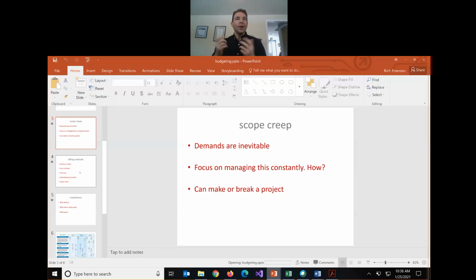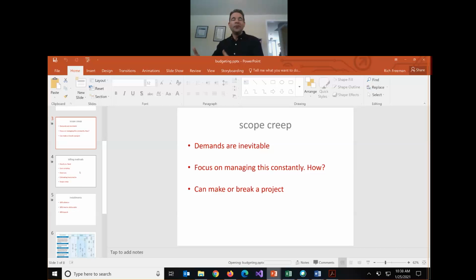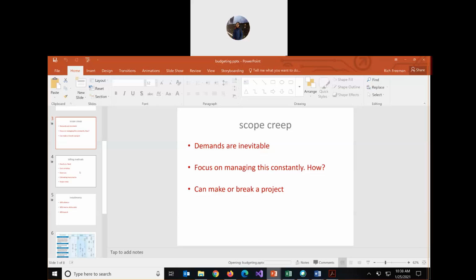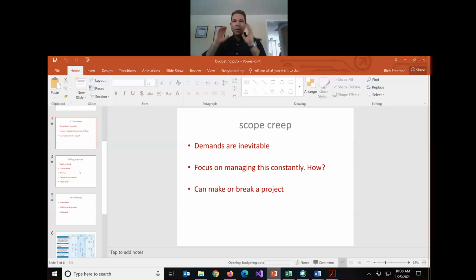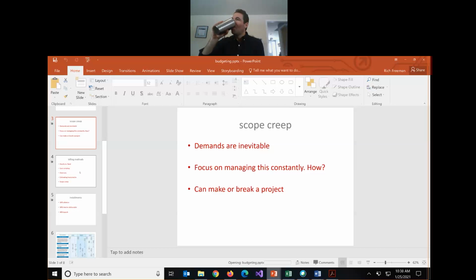They're going to put a window here, but they're going to say, well, this isn't what we agreed to, and we didn't budget for this window, so we'll do it, but now we need more time and more money to cut away the brick and buy the glass and put it in. So I think that's the approach to take with scope. Yeah, I think it is always good to make the budget based on the hours.